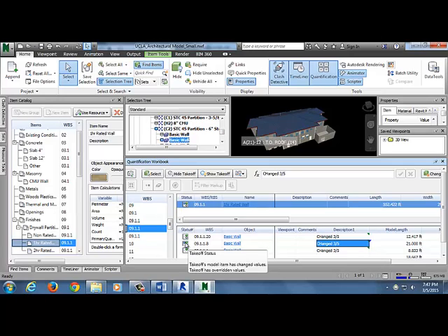And so in your takeoff, it's still going to show all your same values. And so that's why you want to check all of these and say, oh, deleted items, I can either make a note, say it's deleted, and leave it in, or just delete those takeoff items because they've been deleted from the model.